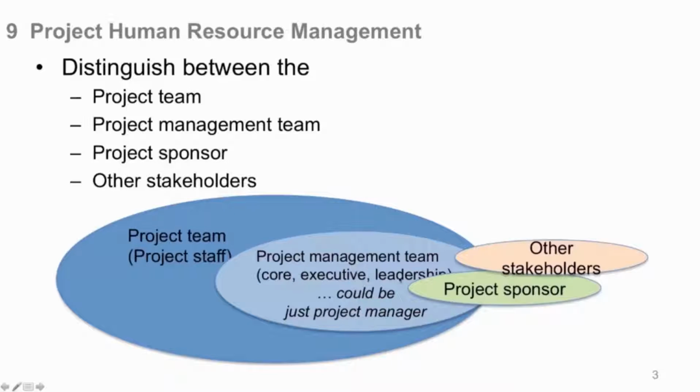The project sponsor over here is, of course, a very important person. He is your key stakeholder, and he interfaces directly with the project management team. And what this tries to depict is he is generally not encouraged to talk to the rest of your team, either behind your back or with you. You want all direction for your team to come from you, the project manager. So that's why it's depicted like this.